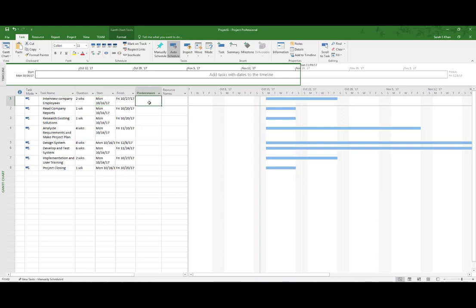We did determine which tasks depend on other tasks to be completed first so they can be started. We determined that the first and the second task could be started in parallel, so they weren't dependent on each other. However, our third task was dependent on our first 2 tasks. So we are going to enter task 1 into the predecessor of task 3.